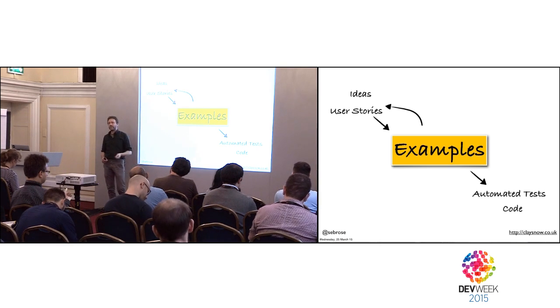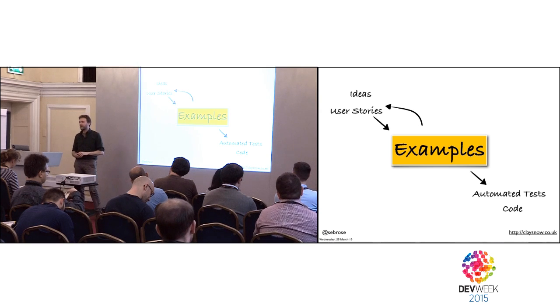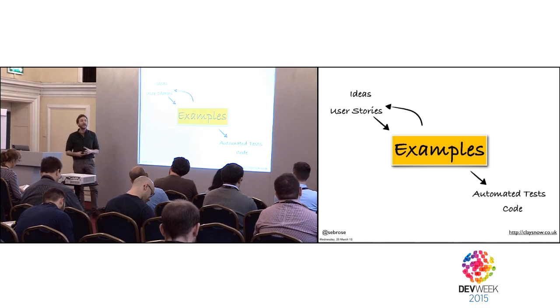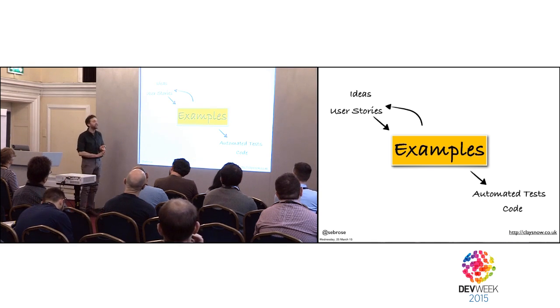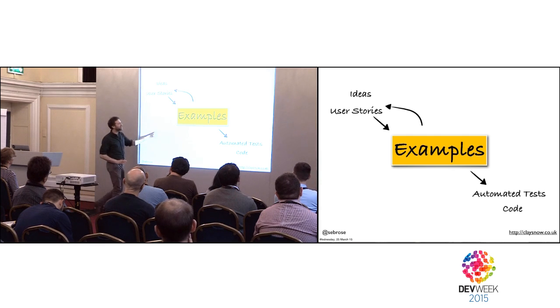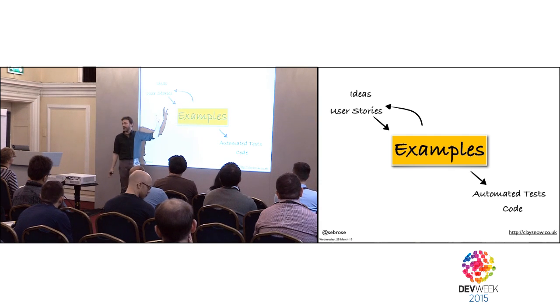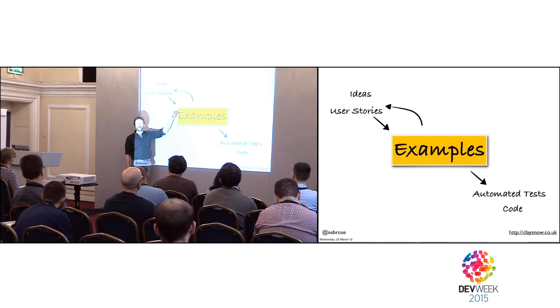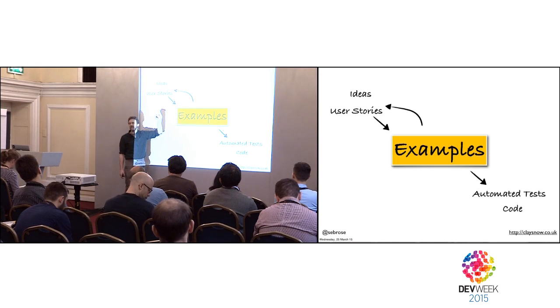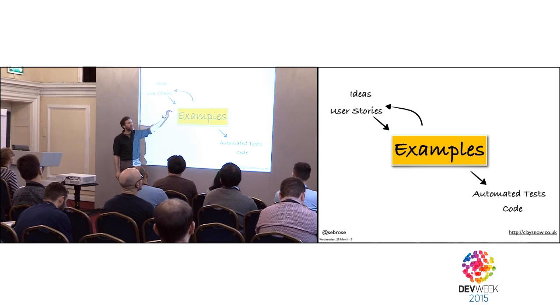And those different examples will then challenge the understanding that the customer, the product owner, brought to the workshop, and will discover unarticulated assumptions, contradictions, paths that hadn't been thought about before, features that can be deferred until later. So this is the core meeting where those three, and maybe others, will try and explore the feature with actual concrete paths through the system using concrete data items to discover the hidden assumptions, discover things that you don't know that you need to find out, discover features that have not yet been articulated.